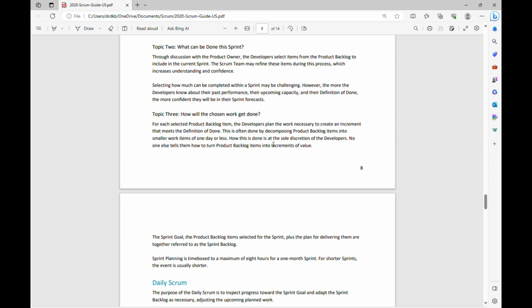Now they identify and prioritize the sprint tasks, developing a timeline for the items in the list. Often this means turning the backlog items into work items that they will work upon during the sprint. And by the end of the event, in the Scrum team, everyone should know what the overall sprint goal is, and if there are any sub goals, and which backlog items will be part of the sprint, and who will be responsible for what task.